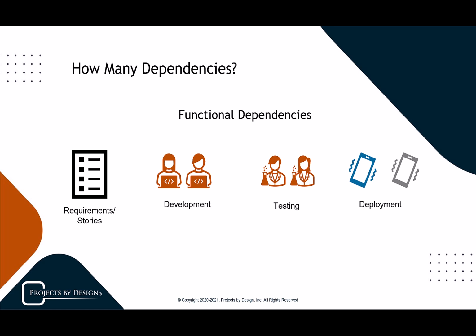So there's essentially just 4 steps within the project, right? That we get the requirements, develop, test, and deploy. That's really the major work items, so to speak. Okay? So if I were to run that interaction or relationship formula, right, that's 6 interactions, right? 4 times 4 minus 1 divided by 2.